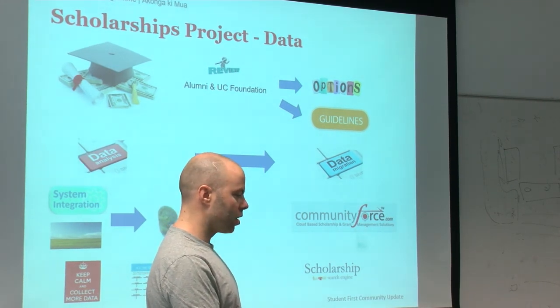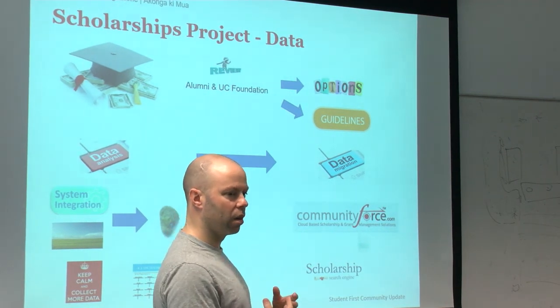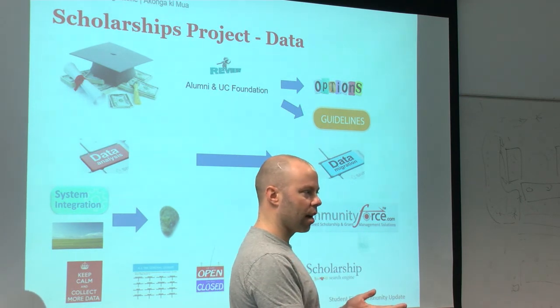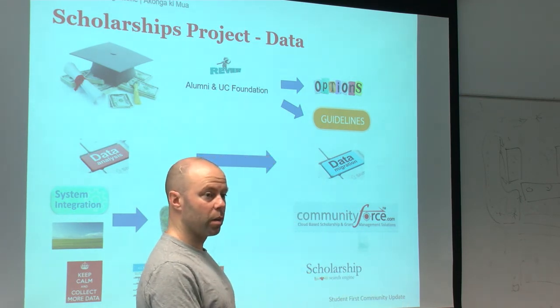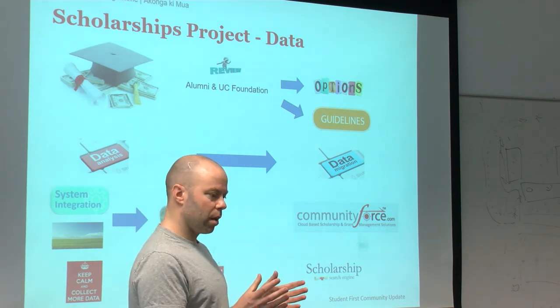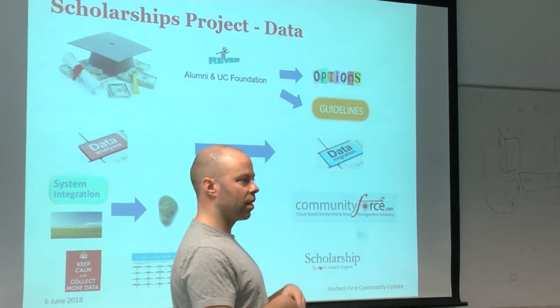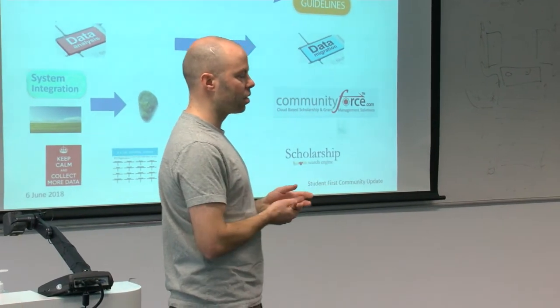In terms of user acceptance testing, the UAT, this is where we say we think it's pretty good, we can put it out and leverage the experience in the business. Although we're looking at it from one point of view, we may not have thought about all the different business contexts in which it's going to be used. So that flushes out any other issues.